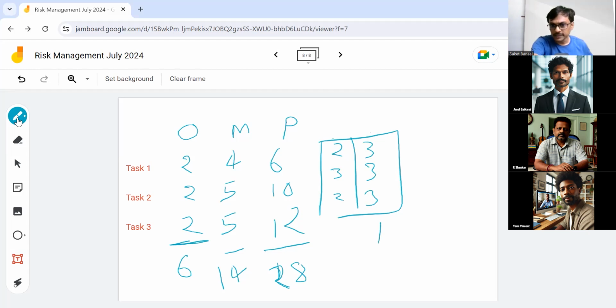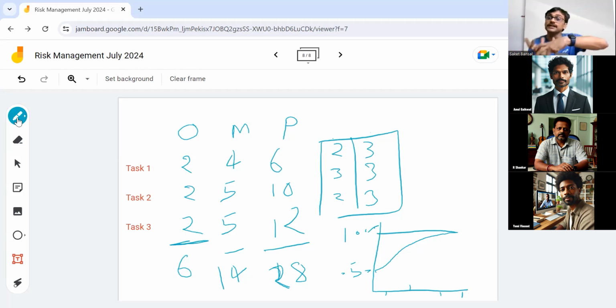And they may plot that, out of 1,000 totals, how many are coming in less than 20. So they can show a probability graph, with days on one axis and finishing probability on the other. I can say that at this much time I have a 50% probability, and I reach 100% probability somewhere here. So the randomization by the tool can show me what percentage of the random combinations came below 20 days. Based on that, we can say there is a 70% chance we will finish in less than 20 days.